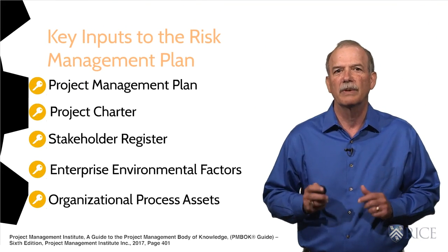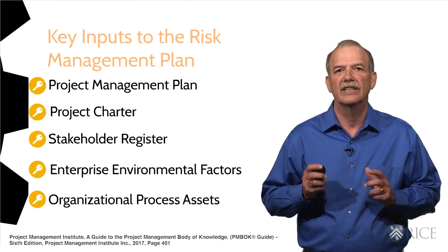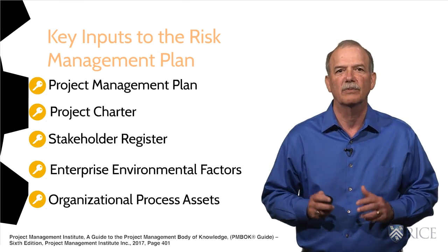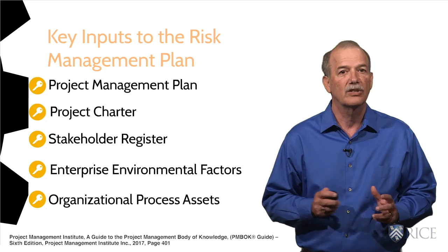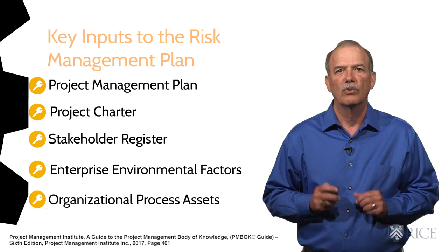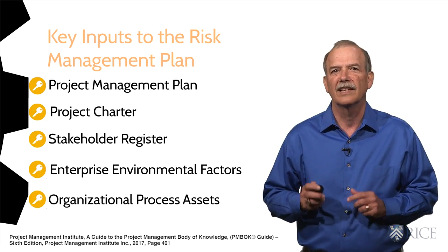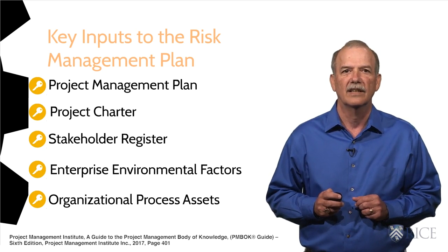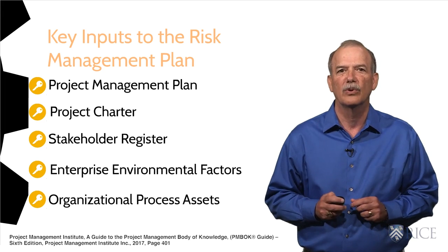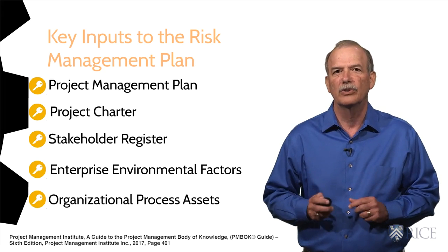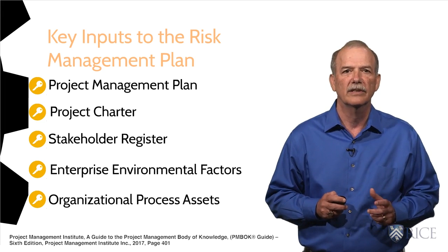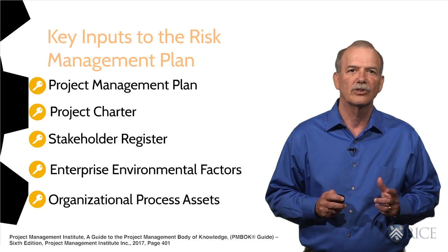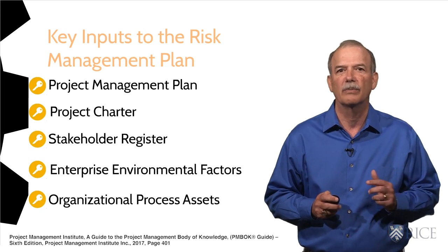As we develop the risk management plan, we should consider the existing project management plan documents already developed and the project charter. Remember that the project charter should contain the high-level risks identified as the project was authorized. These must be considered as we move forward. Other inputs to the risk management plan might include a list of the stakeholders along with the information we have gathered from them on their concerns,